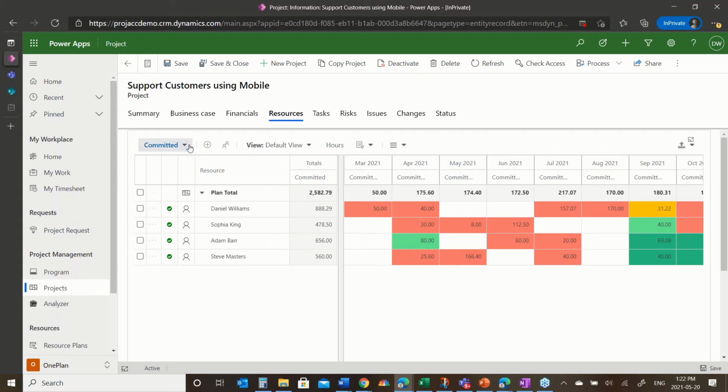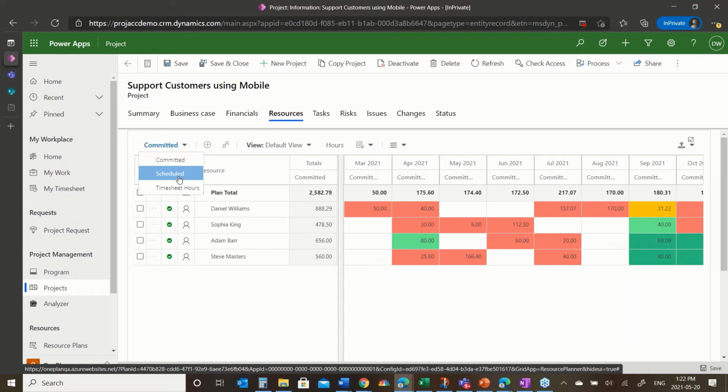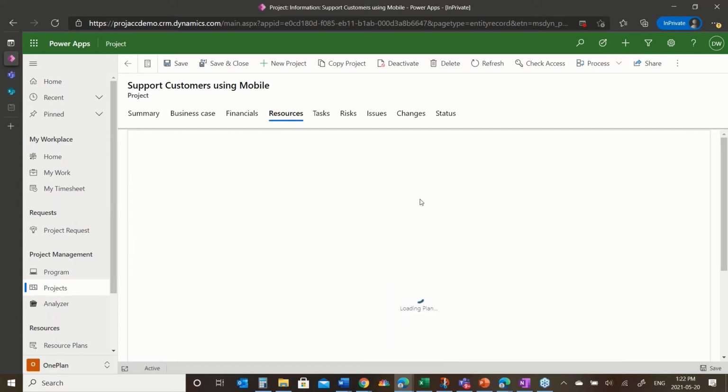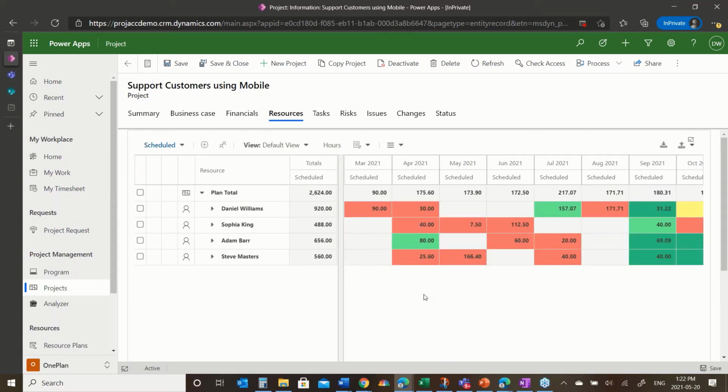Then they can draw in from a schedule or from timesheets what actually occurred on that particular project and pull some data in. So here's what really happened. Here's what we've scheduled. Then we could look at what timesheet hours are to see what actually occurred. So start to look at, here's what I asked for initially. When I built out my detailed schedule, it became this. Some time shifted around. As the schedule evolved, things would move based on the progress of the project.